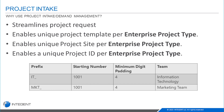You can get a completely different project site template per Enterprise Project Type, so the work breakdown structures can be completely different. Also, the project ID can be unique as well, so organizations that need the project ID to be different per type will have that totally supported.